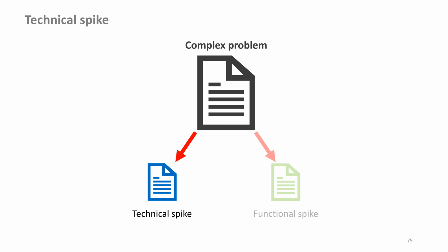The technical spike is more commonly used. It is used to evaluate the impact of a new technology on the current implementation. We need to try a new technology to gain more confidence for a desired approach. Example of a technical spike: How long does it take to update the display at the client side for their usage patterns, determine communication requirements and bandwidth, and decide whether to push or pull the data?